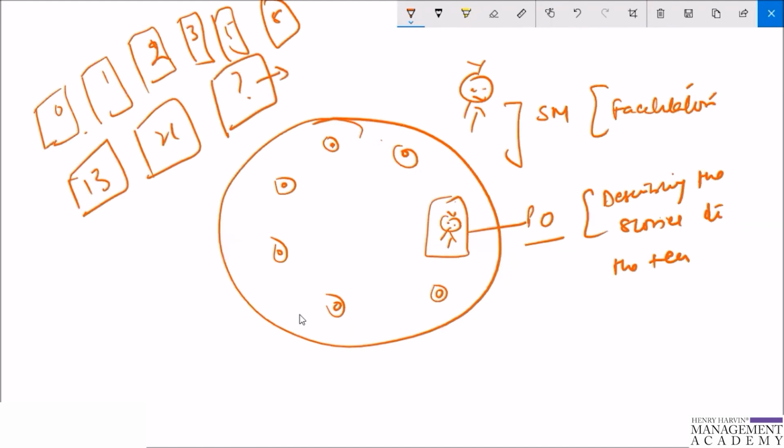Question mark means that the team doesn't understand the story. It might be a possibility that the team doesn't understand, or it might be a possibility that some of them don't understand. Zero means they feel that there is no effort required to do this story. They can do it without giving any effort. It might be a very small change.